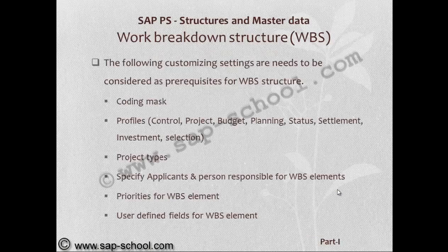The following customizing settings need to be considered as prerequisites for the WBS structure: coding mask, profiles such as control profile, project profile, budget profile, planning profile, status profile, settlement profile, investment profile, and selection profile, and project types, specify applicants and person responsible for WBS elements, priorities for WBS elements, and user-defined fields for WBS elements.